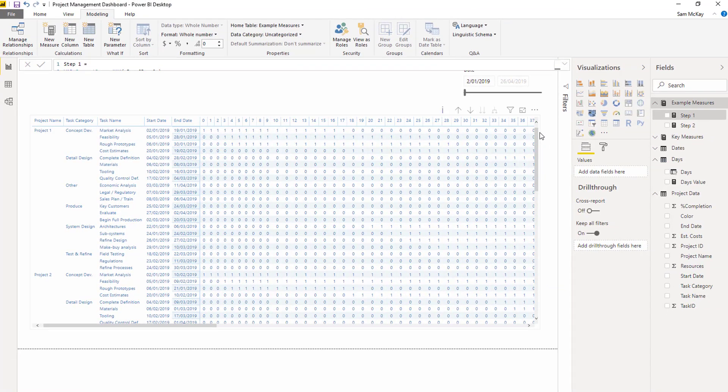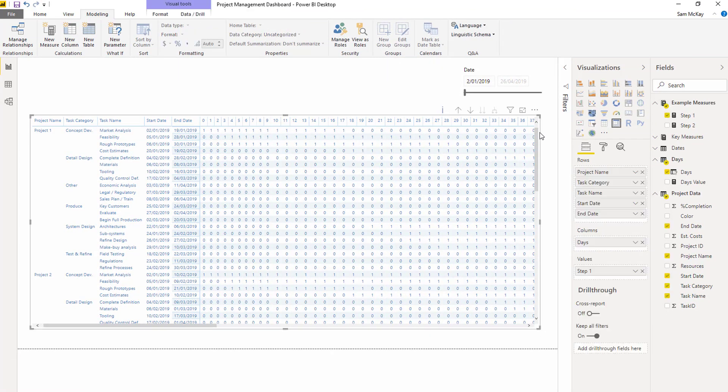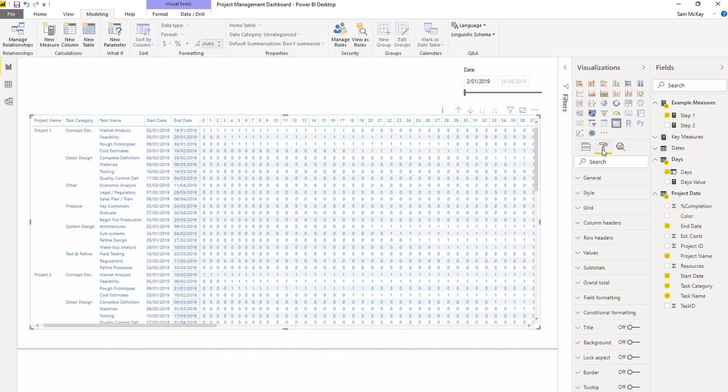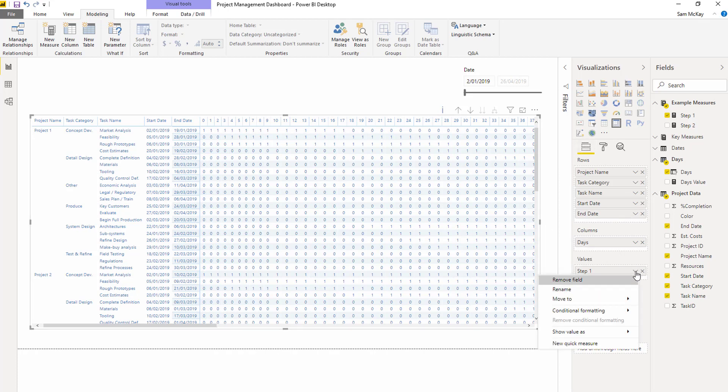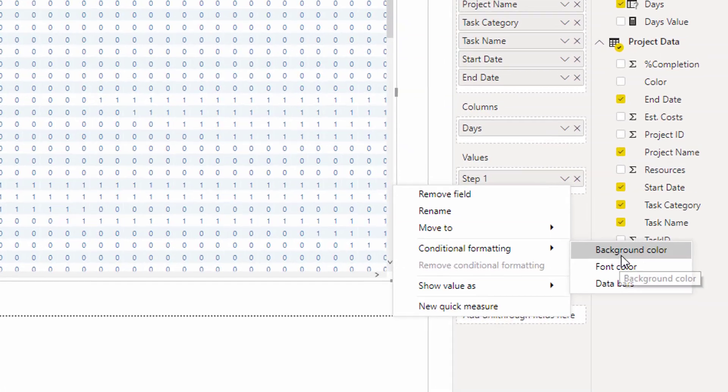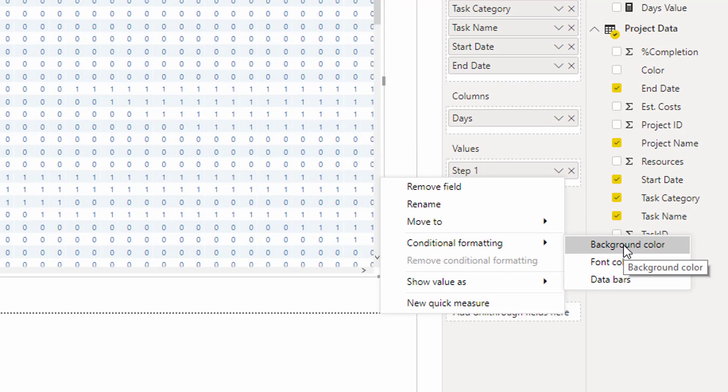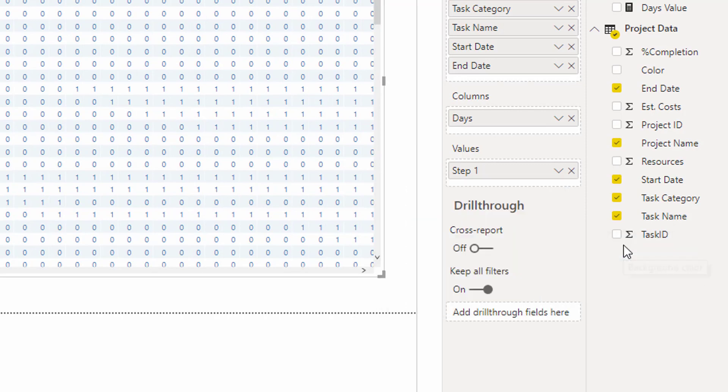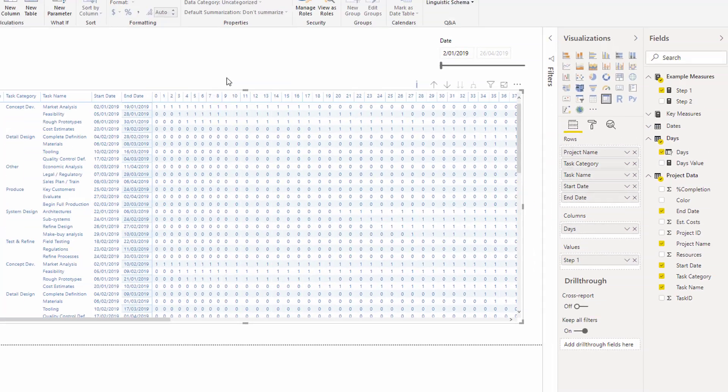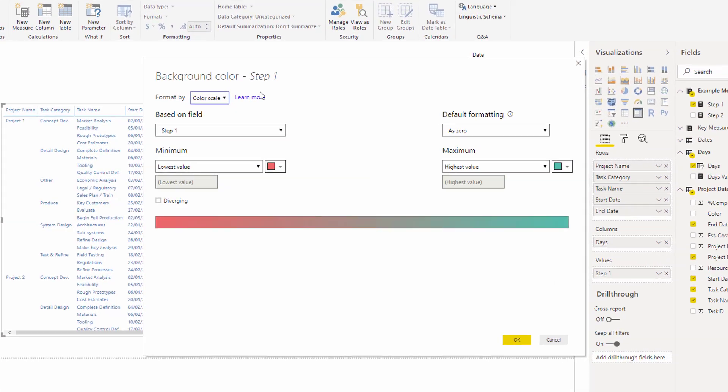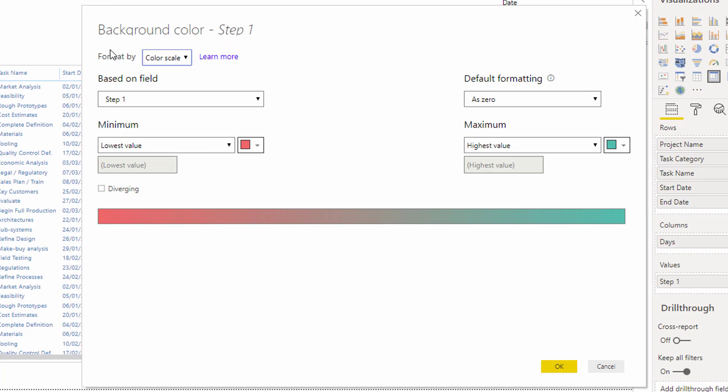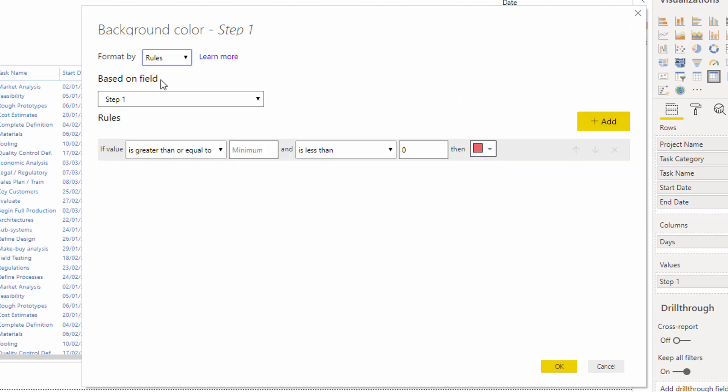Then I want to show you a little trick around how you can turn this into a Gantt chart. What we can do now inside matrix visuals is create conditional formatting based on rules. I'm going to go conditional formatting, background color. This will bring up a pop-up box. Then I'm going to go format by rules.